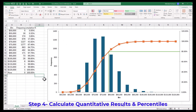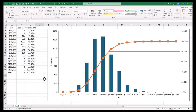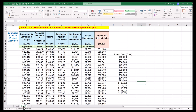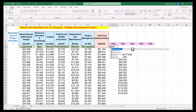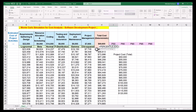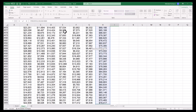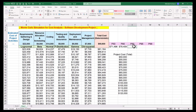Step 4 is to calculate quantitative results and percentiles. We have simulated project costs for 5000 iterations and drawn the histogram, which is similar to the probability density function or PDF. The S-curve, similar to the cumulative density function or CDF, allows calculation of percentiles to analyze uncertainty. To calculate the 50th percentile or P50, click the relevant cell, press equal, and enter the percentile.exc function selecting the output array. Enter 0.5 as the kth argument. Follow the same procedure for P80, P90, P95, and P99. The increasing trend in stochastic cost estimates confirms rising confidence intervals.